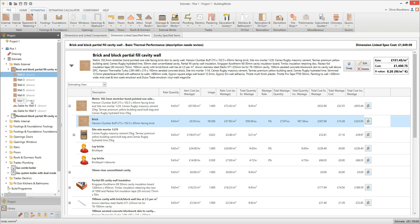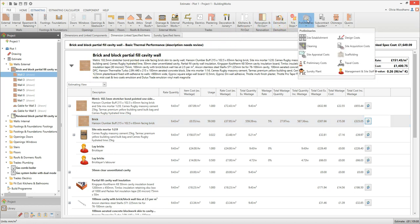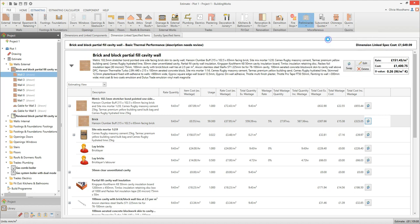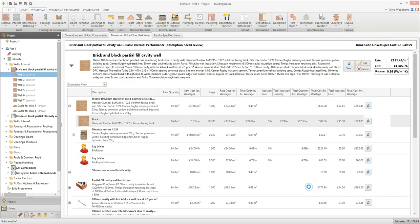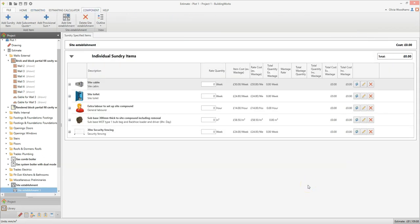Now let's add some preliminary costs to the estimate. On the estimating tab, click the preliminaries button and select site establishment from the drop down menu. Select the site establishment specification and then click finish. The site establishment estimating calculator is a list of sundry costs — simply type in the rate quantity of each item you require. Let's say I need the site cabin for 26 weeks — that's 6 months — and the same for the site toilet.